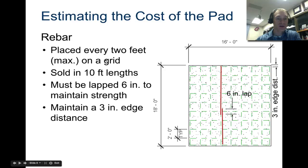Rebar is placed every two feet on a grid. It's sold in 10 foot lengths and it must be lapped six inches to maintain strength. So you can see we have one stick here, one stick here. There's a six inch overlap that you will actually tie together with pieces of wire, and as those things are next to each other and sunken deep into concrete they act as one continuous piece. You also need to maintain three inches edge distance. We have this bar three inches away from the outside edge on this side, three inches away from the outside edge on this side. So if it's 18 feet, we have a 10 foot bar and an eight foot bar with six inches overlap.